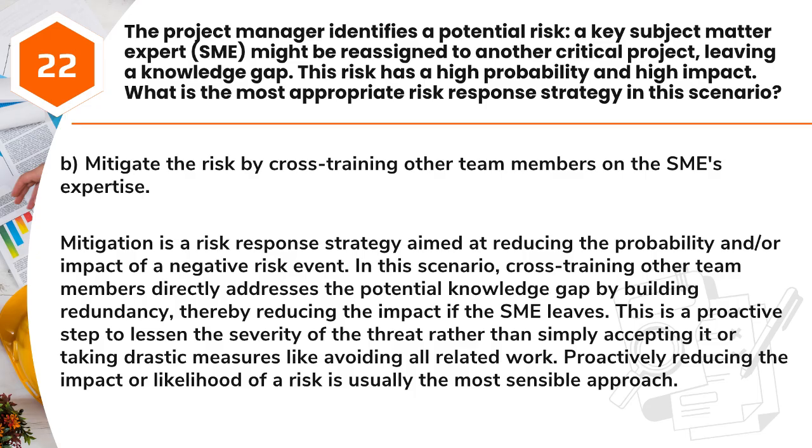Answer: B. Mitigate the risk by cross-training other team members on the SME's expertise. Mitigation is a risk response strategy aimed at reducing the probability and/or impact of a negative risk event. In this scenario, cross-training other team members directly addresses the potential knowledge gap by building redundancy, thereby reducing the impact